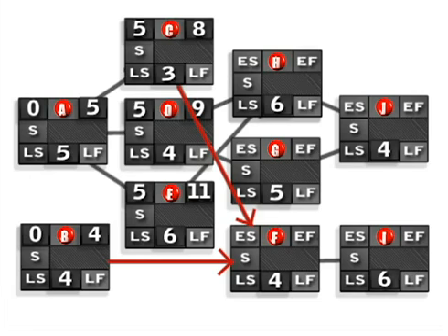You see that we have an early finish of 8 for activity C and an early finish of 4 for activity B. Remember by definition that all of the predecessor activities have to be complete before the new activity can begin. That means that we have to choose the highest of the 2. So we're going to choose 8 for our early start for activity F.